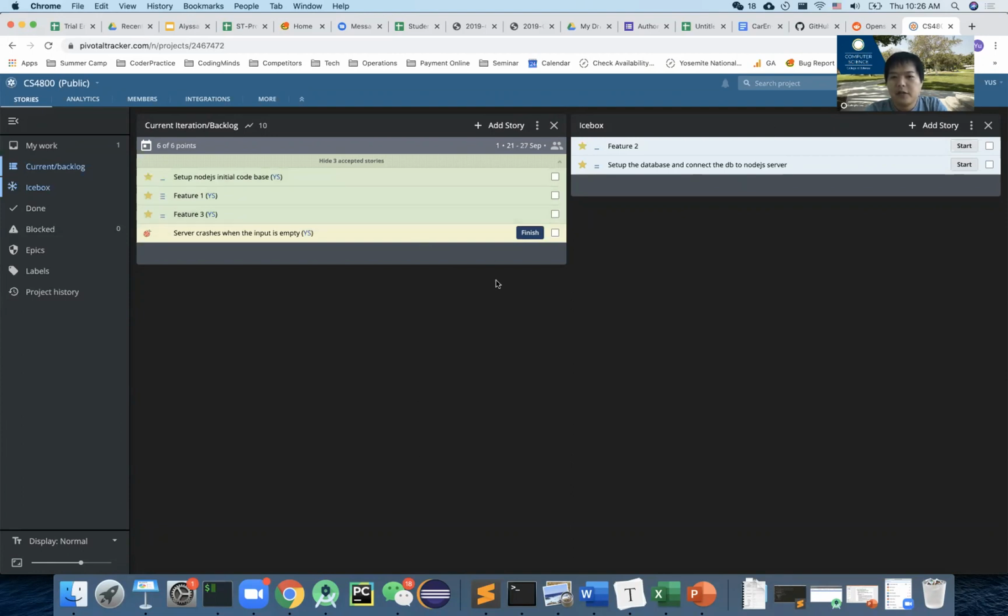But the bottom line is everything you work on should be an issue first. It should have some specific tasks. The reason is once you have this, you can assign it to somebody, and that will be very clear on who is going to handle what. Because communication sometimes is really a big issue as we do all this development. We want to make sure everyone knows what they do, and also that people are not working on the same thing in a duplicated way. So this clearly gives the issues, assigns them to somebody, and then tries to control the steps.